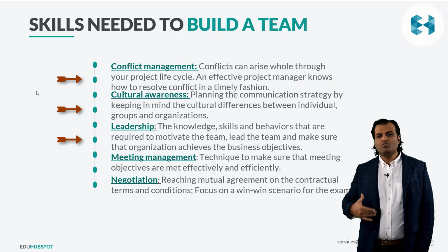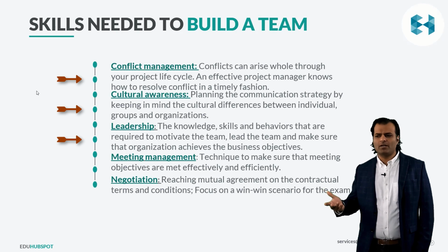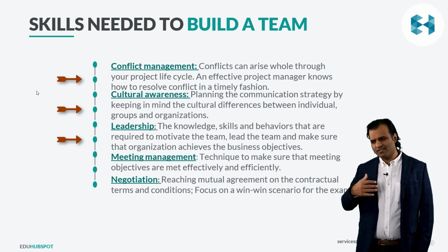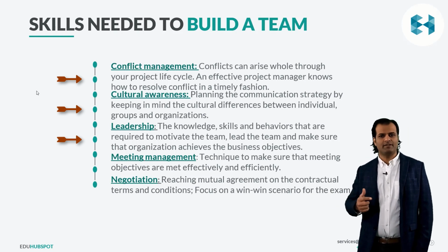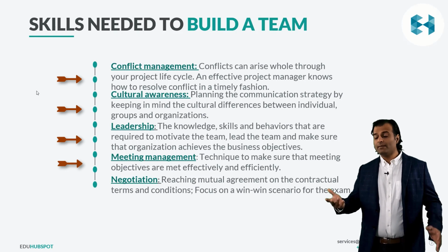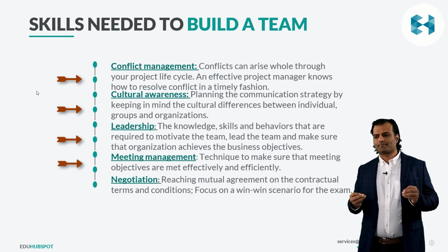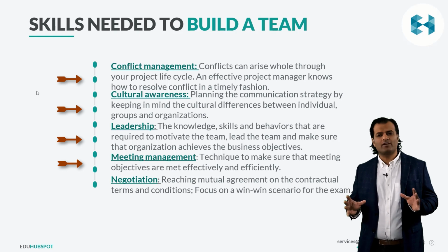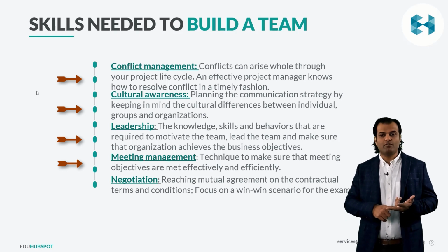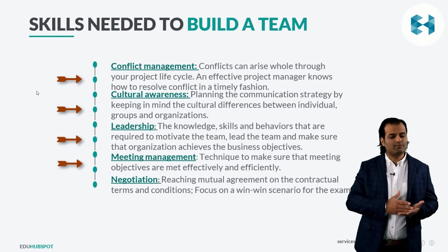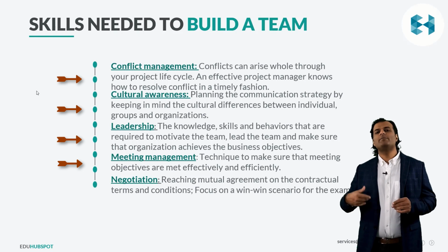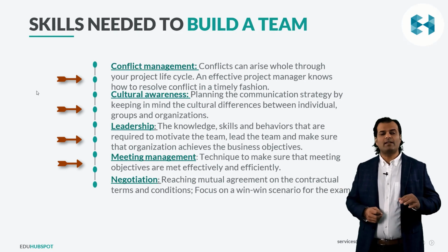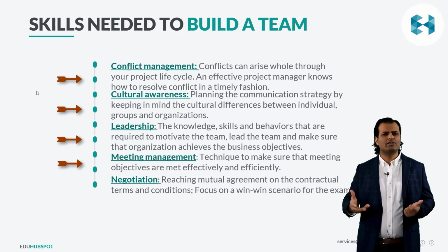Leadership skills. You need to show your team that you are the real leader who wants to help them, and not just thinking about your own self and the company. Think at the overall level, be a servant leader basically. And we'll talk about that in the agile video. Meeting management. Meeting management is more about, for example, you should put the agenda 24 hours prior to the meeting. That's your meeting management. What are the things you have done to make sure meetings are effective? Like be on mute if you're not talking, those ground rules kind of a thing.